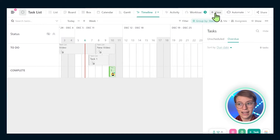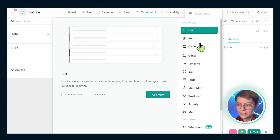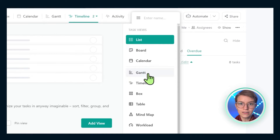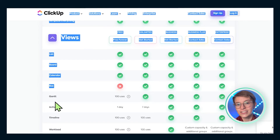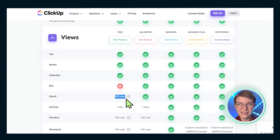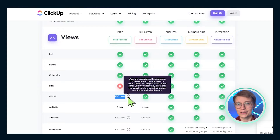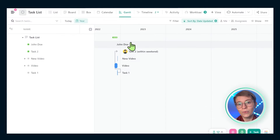Let's flip over to Gantt view. Gantt view in ClickUp, just like timeline, is found under the plus view menu, and you'll find the word 'Gantt' right below the subdivider for task views. Gantt view has that same 100 uses restriction for free plan users. It's a strange way to dole out features, but for anyone on the unlimited plan and up, you have unlimited uses of this view.